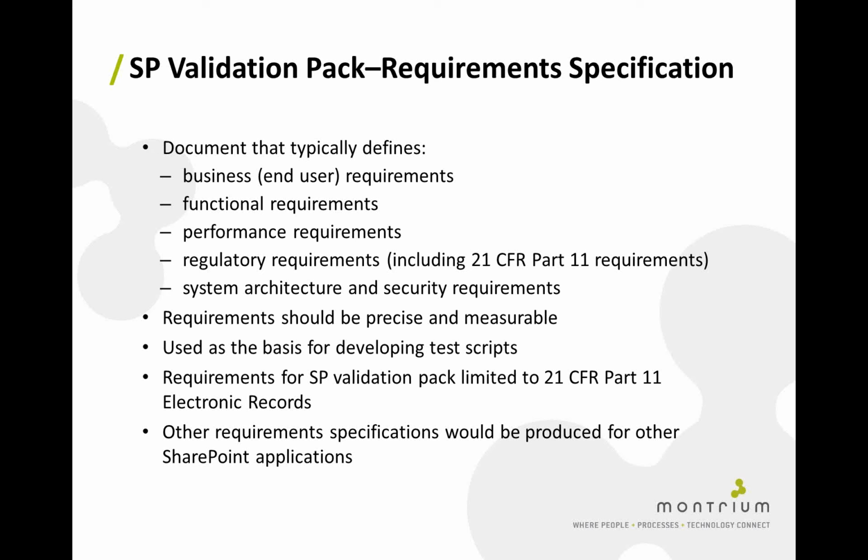When we think about SharePoint and the validation pack that we're talking about here, we're limiting our requirements just to 21 CFR Part 11 electronic records, so it's fairly minimal. We don't want to test all of the various functional areas of SharePoint, only those areas that we require to meet 21 CFR Part 11. For example, we're not going to be testing check-in and check-out of documents. We're not going to be testing whether I can start a workflow, or create a Word document in the system. All of these things we know we can do, and they've already been tested by Microsoft. We're really testing things like security and audit trail, which are required by Part 11.